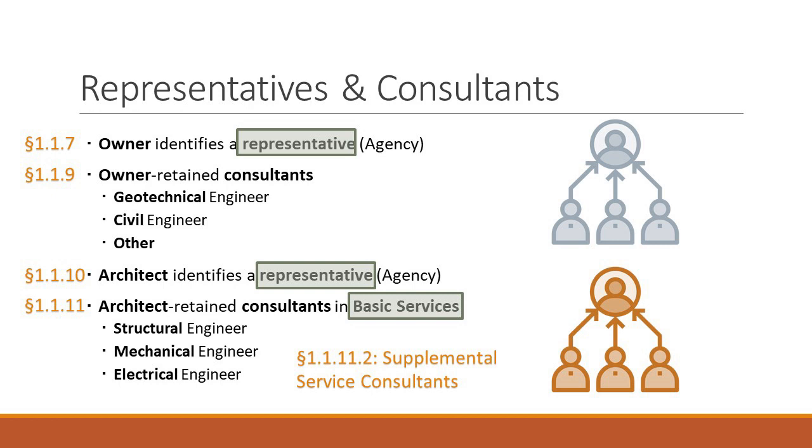And so there's this separation between 1.1.9 and 1.1.11 with respect to consultants being retained. Both parties identified their agent/representative, and now they have to identify who they are bringing to the table to assist them. Now, geotech and civil are typically brought by the owner.